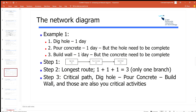Let's look at a very simple example. I have three activities: dig a hole — one day; pour concrete — one day, but I need the hole completed first; build a wall — one day, but I need the concrete finished first. Step one: draw it out knowing the durations. Step two: identify the longest route. This is easy because there is only one route — dig a hole, pour concrete, build a wall — so it's one plus one plus one equals three. That gives my critical path and all activities are critical.